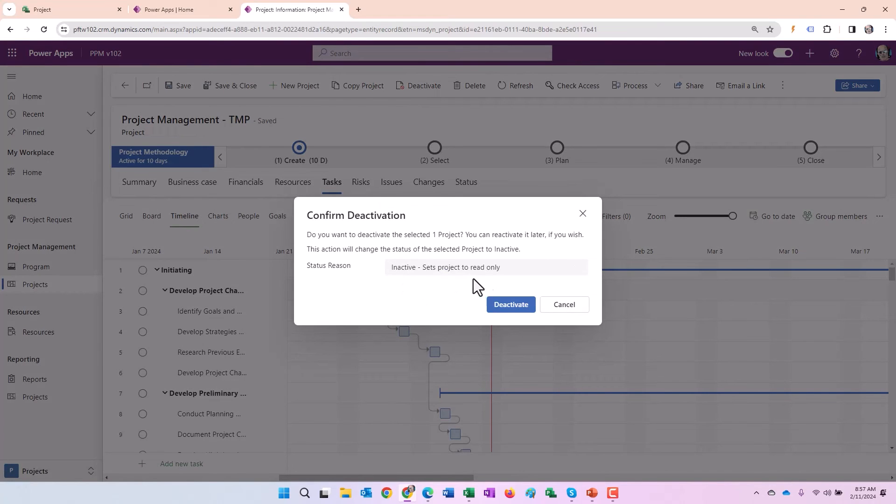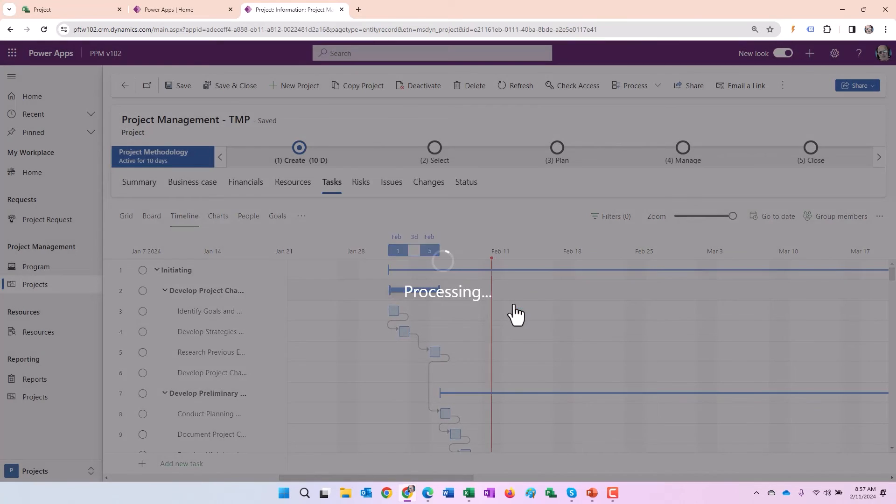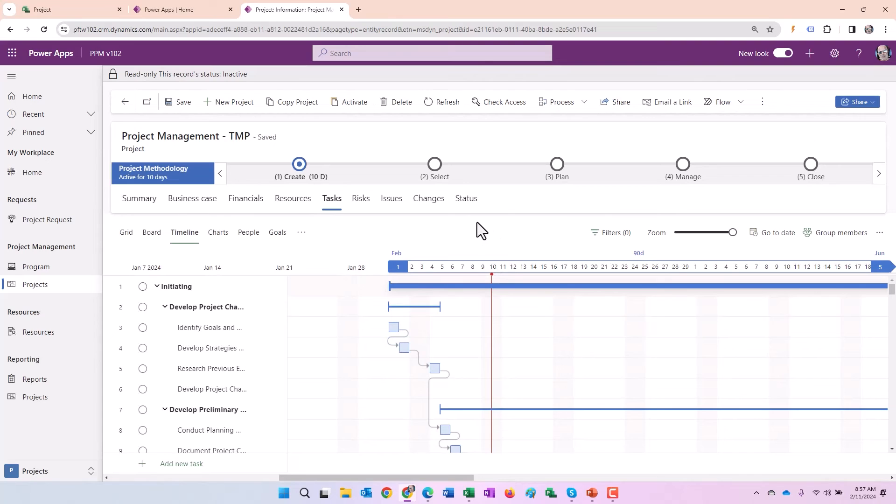There's a deactivate button in that same toolbar we noticed before. We can go ahead and select deactivate. This is going to set the project to read only. Again, it's what we're going to want to do with the template since we're not going to want to have other people accidentally update that template. So that took care of that.